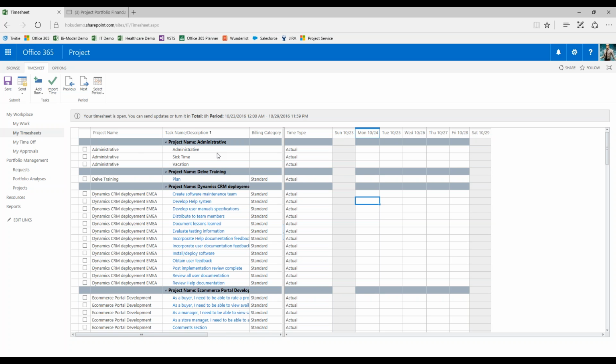That being said, if a third-party system is in place and is not going anywhere, the information that you would ordinarily enter in here could be garnered or leveraged in here via Tivitie Project Connect to grab that information that's being reported on a time phase basis elsewhere, but leverage it for project visibility against your planned information. Since timesheet systems typically only track actuals, to get it in here to compare with your plan versus your actual gives you some power in tracking on progress and overall health of the project as you move on through.